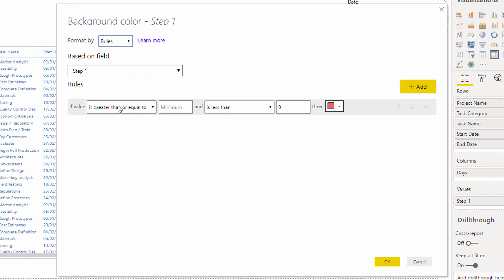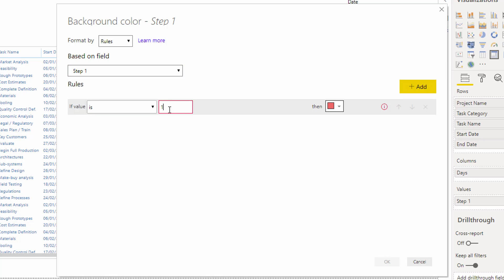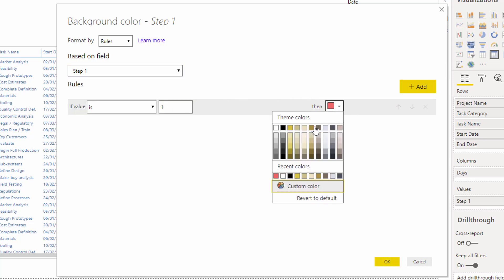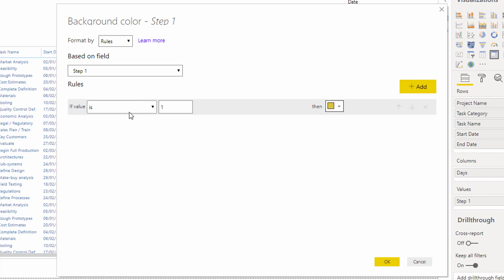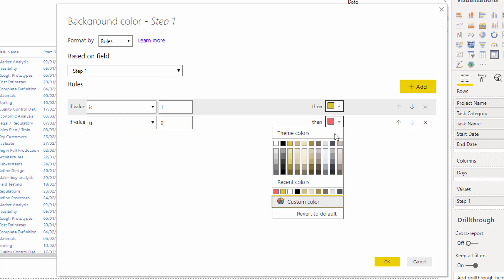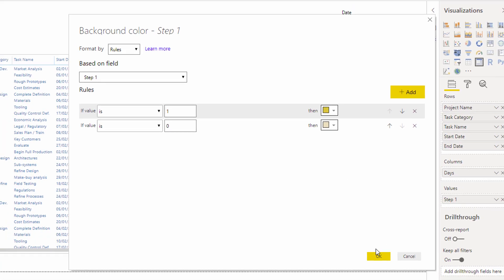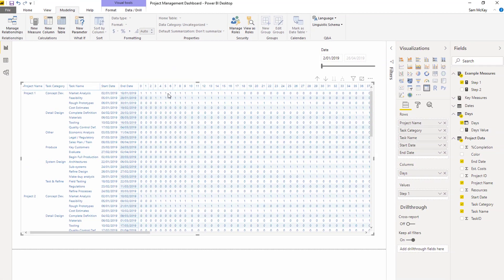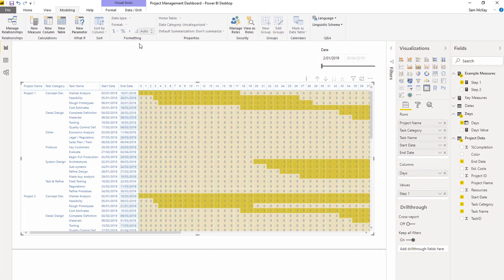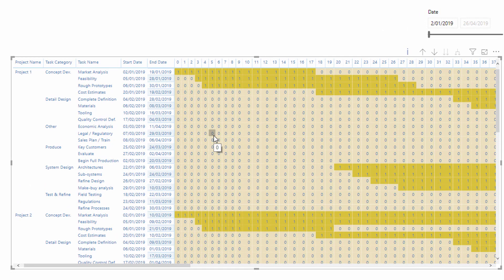Then I'm going to say, if step one, my measure, so this is my measure, is equal to one, then I'm going to make that gold. Then I'm going to add, if it is equal to zero, because I know it's only zero or one, then I'm going to equal that to a much lighter shade. Then I'm going to go okay. And you see now that based on that conditional formatting, we can actually change up the look and feel of our matrix pretty significantly.